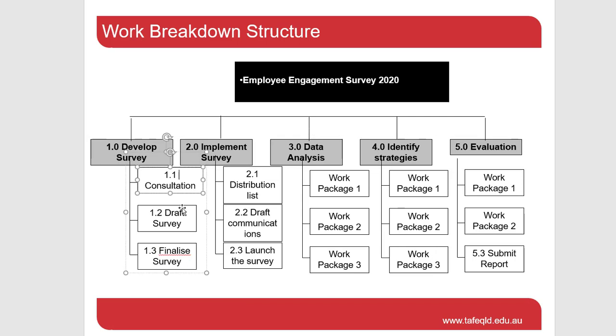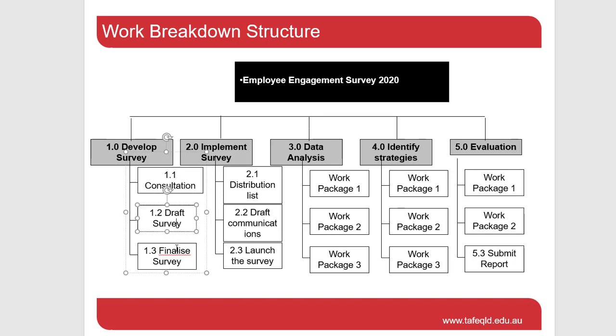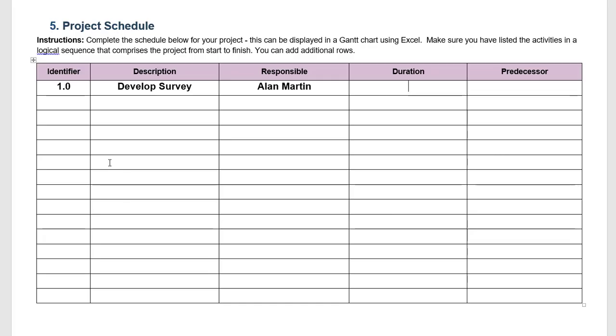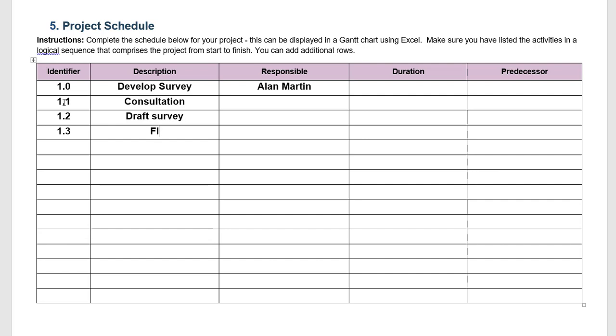We need to do some consultation to draft a survey and then finalize it. So our first step is to decide and figure out how long these will take. We can do this through consulting with experts, looking at previous projects, but we really want a pretty good guess or guesstimate as to how long these things will take. Let's put them into our template. So 1.1 is consultation, 1.2 is to draft the survey, and 1.3 is to finalize the survey ready to be implemented.